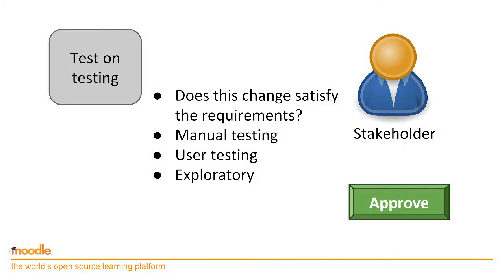The first stage of testing is where somebody who requested a change needs to verify that the change actually achieves the outcome they were looking for. It's not just 'does this thing work' — it's also 'does this thing work nicely.' Are we happy with the user experience? And exploratory testing across different browsers and different combinations of settings to make sure that yes, we definitely want this change on our production server.